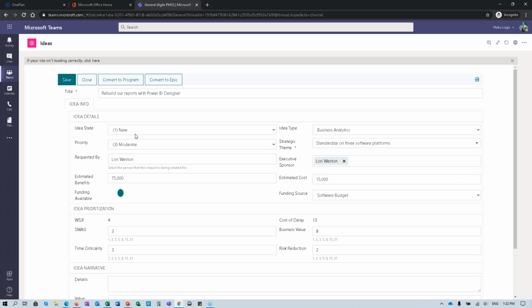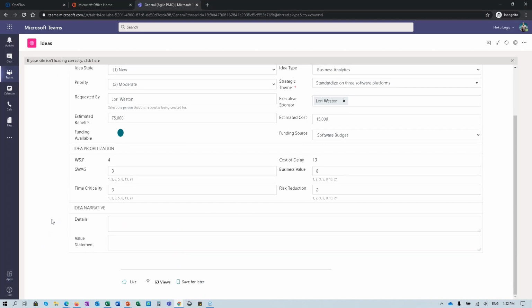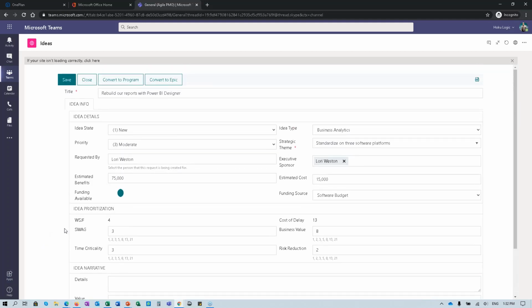But just to highlight the capability, we have the form that allows you to capture your lean business case, or really, the first set of data points that you would need on an epic within your funnel stage. These are all going to go to funnel. Within your funnel process state, there's really no limitation in terms of how many you can have. We do want to manage the aging, though, to make sure that we don't have items there that have been sitting and not attended.